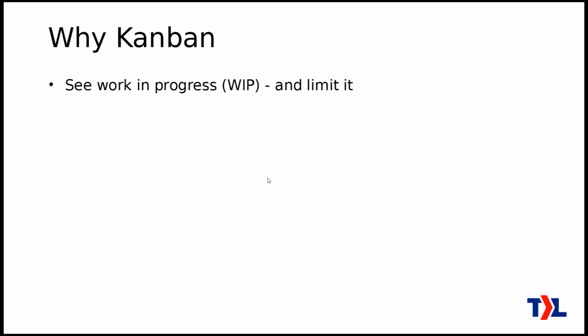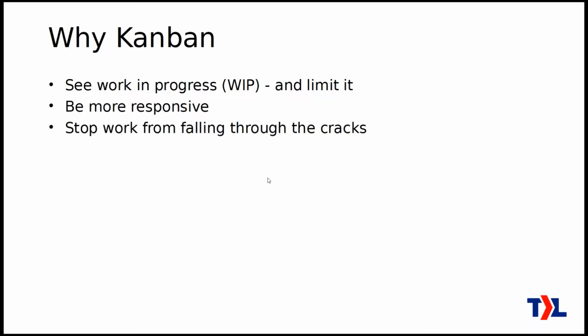You can see the work in progress. And when you can see it, then you can limit it. I'll get into why that's important more later. You can be more responsive as a team when you have less work in progress. You can stop work from falling through the cracks because it's really easy to visualize how long each ticket you've started has been sitting. How long has it been since someone touched it? Are we forgetting about this work?